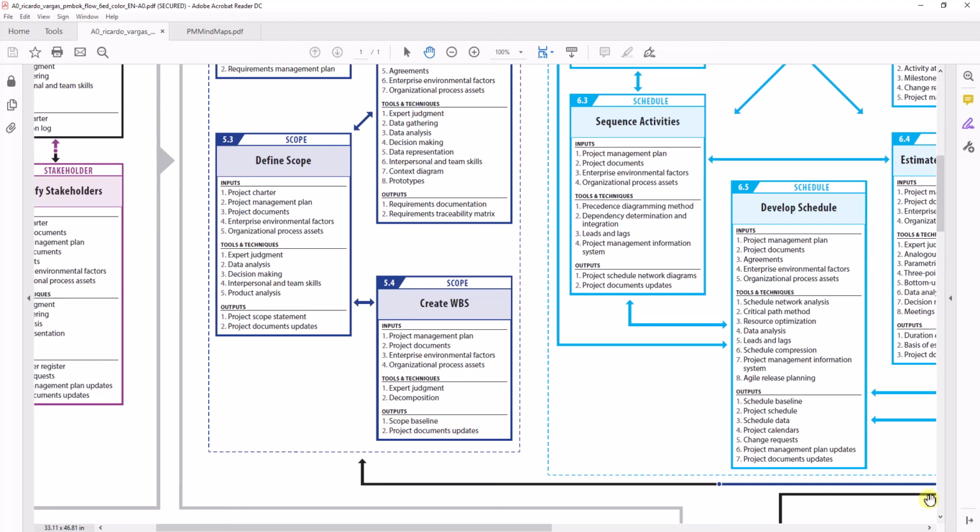Nominal group technique is similar. You take the information you collected in quantity in brainstorming, and then you prioritize it so that you can do a second level of brainstorming. How can you do this prioritization? You rank, you do voting, you give ranks. Say in my 1 hour brainstorming session I gathered some 1,000 ideas. Now I want to do a second level of brainstorming on ideas that are really prioritized.